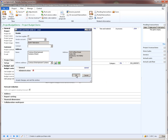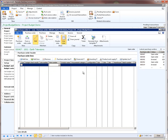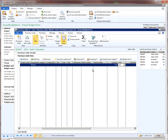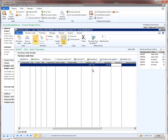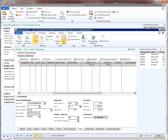I pick this vendor and say OK. We are using data from the Contoso dataset, so you should be familiar with it if you have already worked with Microsoft Dynamics AX 2012. We'll purchase phones — quantity 1, unit each, price $100. Let me look at the line details to make sure the project details are correct. This is our project and this is the category for which we have budgeted. I'll put a sales price of $200, though it doesn't matter from a budget standpoint since we are just doing a cost budget.